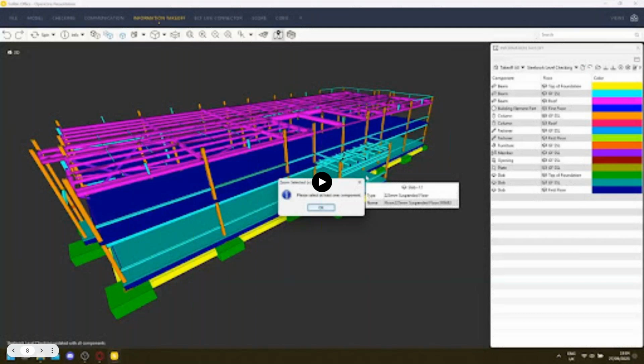So by creating a rule set, or sorry, an information takeoff, we can report on that and send it back to the authors and ask them to resolve it quickly, rather than having the planning team embark on a construction simulation exercise and then discovering it halfway through and missing a deadline as a result.